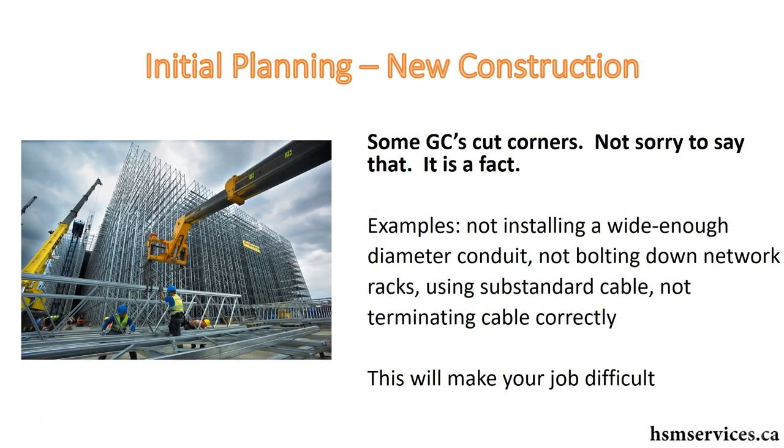And of course, some of them cut corners. It's a fact. Things that they've done, besides horrible delays and damaging equipment: I've had GCs not install wide enough conduit, or use a flexible conduit that you can't pull a cable through, not bolting things down, using a really cheap Chinese cable, not terminating the cables correctly.